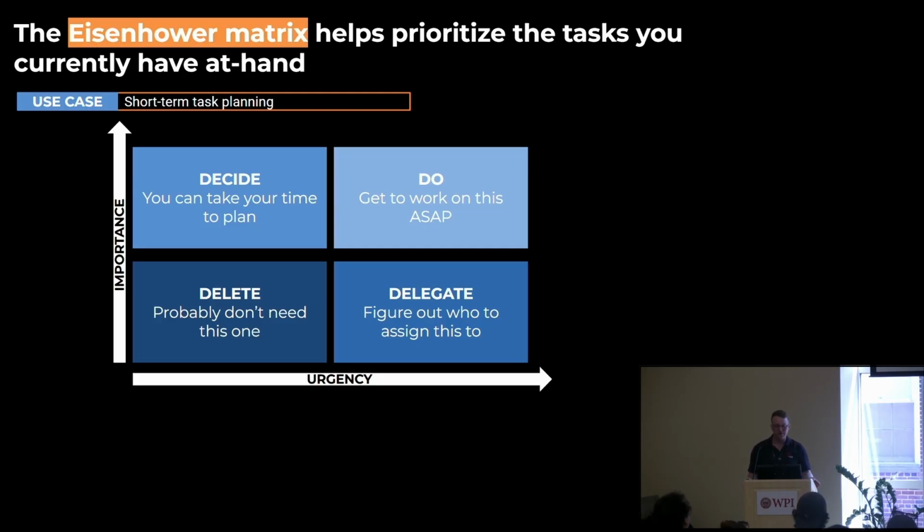If I'm doing kickoff planning, something that is high urgency, high importance is reading the rule manual. It's not going to be a super time consuming thing. It needs to happen right now, and everybody needs to do it. Building the field elements, high importance, low urgency, can happen over the next several weeks. So you can start to see how different parts of your season on a shorter time frame can fit into this.